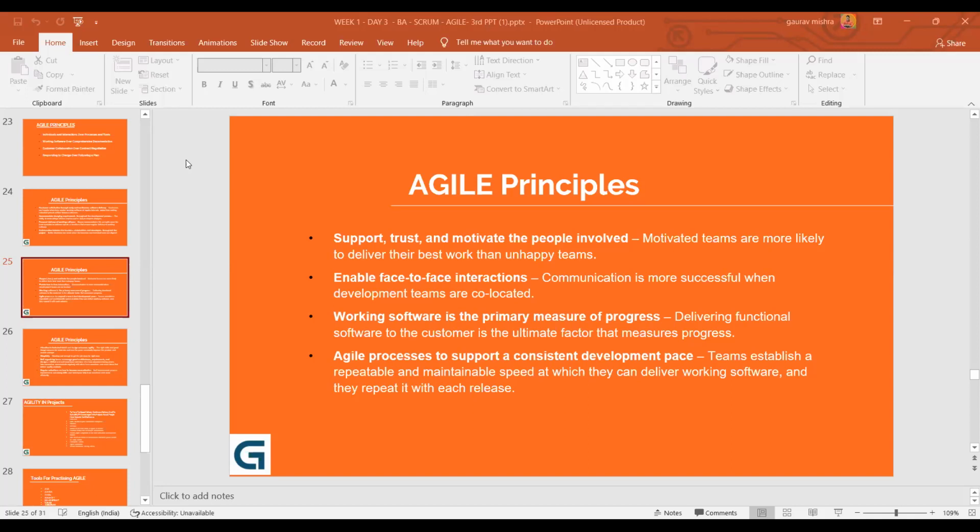So imagine these 4 pointers, men, women, kids and groceries, were your delivery milestones, 25% each. When you finished both the genders and the kids section, you're almost 75% done. So do you see what I did there? I just gauged the progress. I just tried to formulate it in a percentage. Get my point?